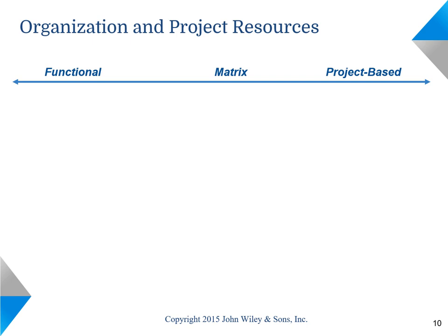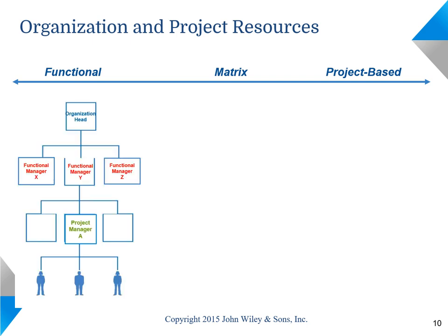There are three types of organizational structure as they relate to projects. On one end of the spectrum, we have the functional organization, where functional managers have control of all resources. A project manager would be reporting to one of the functional managers, while other project staff members are borrowed from other functional managers. Functions may be areas such as hosting, telecommunication, database, support and testing, or cybersecurity.